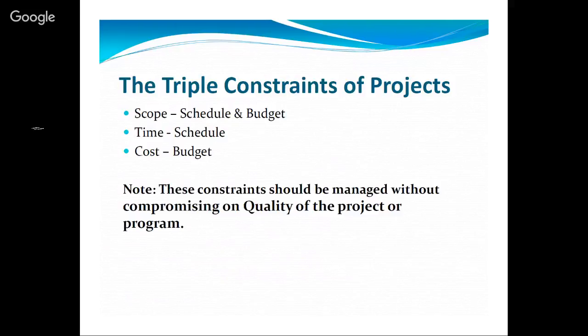And as finance people, as project managers, we need to understand this, that anytime the business asks us for an incremental scope or a change request, we need to understand the financial impact. If we do not really do this, what will happen is that the delivery time will be impacted and the project will be impacted. And in most cases, we will hear them telling us, oh, there are so many cost overruns on this project. But if there are cost overruns, are they as a result of us not estimating very well, or are they as a result of change of scope? This is very, very critical.